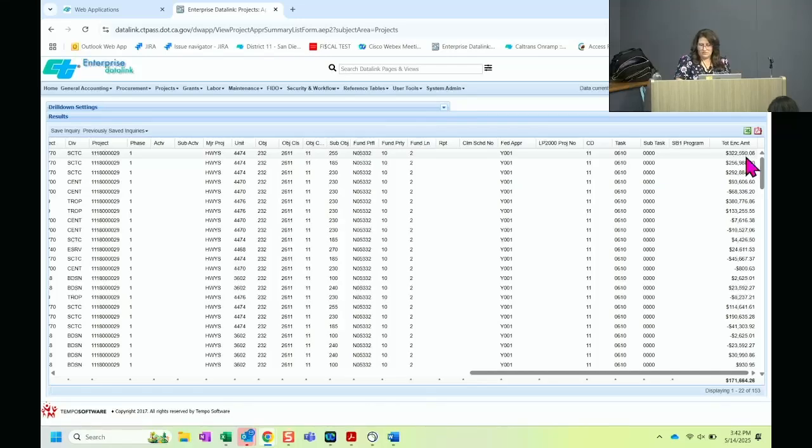322,000 was encumbered. And then you've encumbered some more, and then you liquidated, you paid some bills, so there's all this movement, all the debits and credits to the encumbrances. At the very end, you still have an open balance for encumbrances on your project right now. Phase 1 for federal is still 171,000. So this journal shows you your entire history of what's happening with that encumbrance.